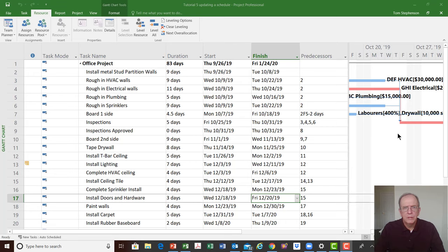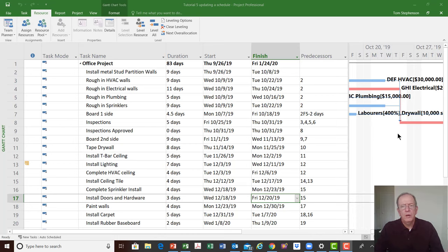In another tutorial I'll discuss file saving protocols that you can use to update your schedule, because in Microsoft Project one of the things we want to be able to do is document where we were at specific points in time. A lot of construction contracts might say you have to provide a formal update to the client once a month — a schedule narrative or summary of what transpired in the previous month. We update that file, see where we are, see where the variances are, and then we do another schedule which is a revision or recovery schedule.